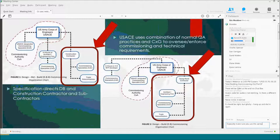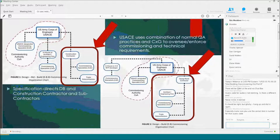ECB 2015-6 is a total building commissioning ECB that's pretty close to expired now. We are working on an ER that incorporates the requirements listed in that ECB. Pretty soon those will be part of an engineering regulation. This diagram is pulled right out of the ECB, showing in Design-Build on the lower right and Design-Bid-Build on the upper left that the construction contractor is hiring commissioning specialists that will handle the heavy lifting of commissioning.